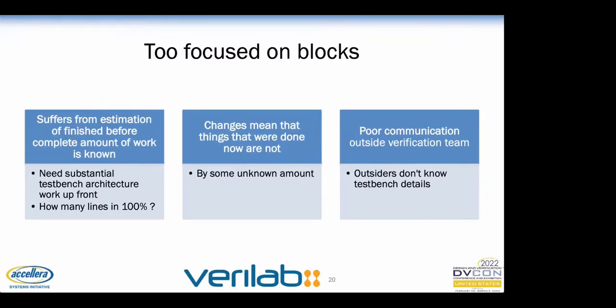We're all familiar with the 80-20 rule, but how do we apply that in a predictive manner? How do we determine how much effort or time is left when a block is 80% finished? This difficulty is compounded when people aren't working on a block full time until it is finished. One pitfall of this method is that any changes to the design or protocols actually change the amount of work the verification needs to do, but those changes are rarely reflected in the schedule estimates.